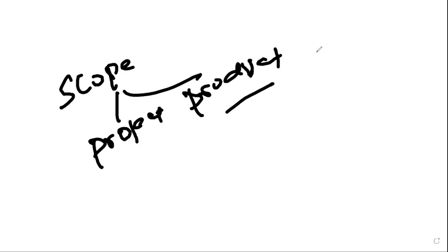That will be a product scope: the features and functions. The work you need to perform to bring those specified features and functions into the product will be your project scope. I repeat, the features and functions that characterize a product will be your product scope. The work you need to perform to bring the specified features and functions into the product will be a project scope. Nothing less, nothing more. So the scope will be one of the important constraints. Being a project manager, I need to manage that.